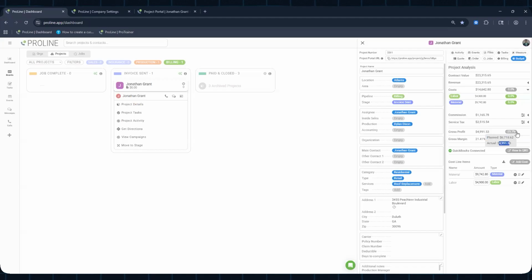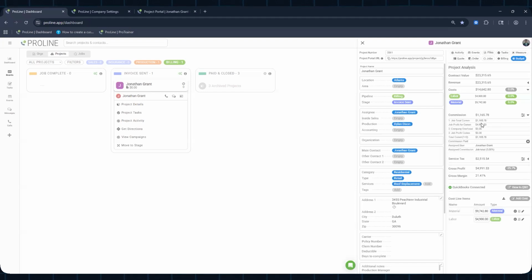So instead, the negative is showing that I'm 25% below what I had planned. This commission is what is affecting my profit margin, showing the negative amount. If it was aligned to what I had planned, it would actually show 0%. So I'm at minus 25.7 below what I had planned for the specific job.